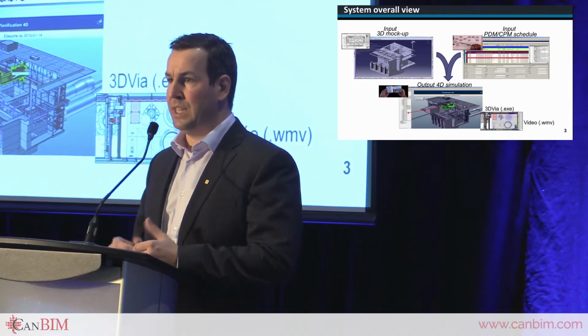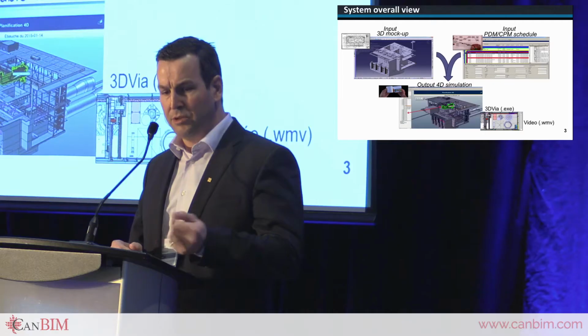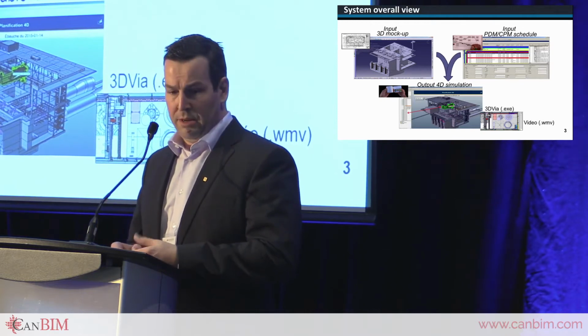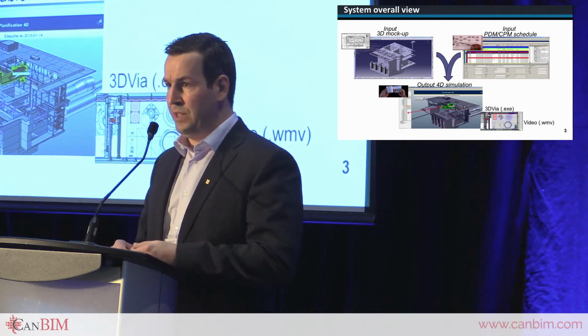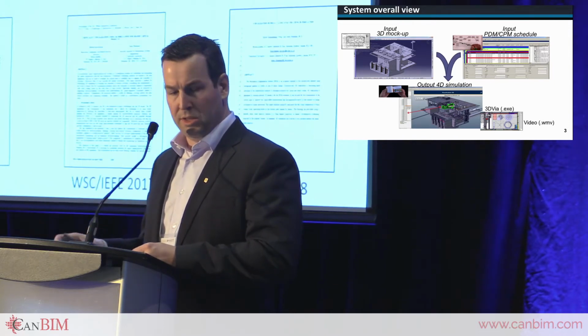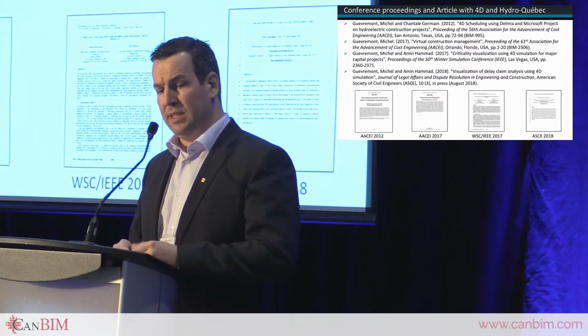And then separately from that, we have another input, which is the schedule. And we use Envera. We used to have MS Project, but now we use Envera. And we integrate this through macros in CATIA so that we end up with a deliverable 4D with the 3D via model of Dassault. And then we have something that's auto-executable in .exe, and then we have videos with narration about our projects. So that's for how we actually put it all together.